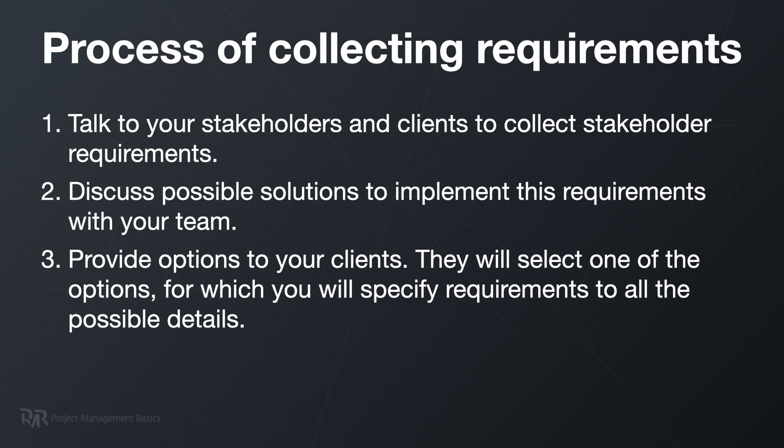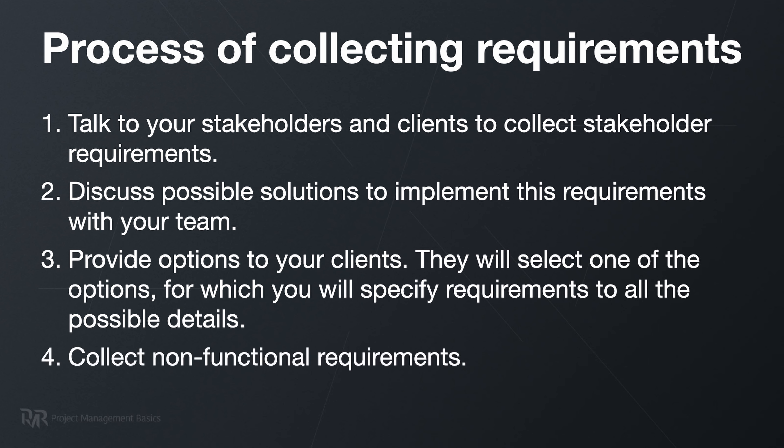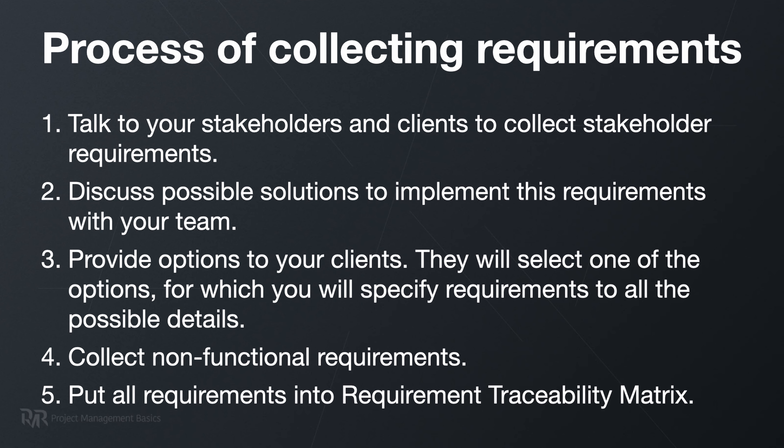You may have one or several solutions, and you provide these options to your client. They select one of the options, and for that option you specify requirements to all possible details. Then you collect non-functional requirements and maybe specify some capabilities or performance metrics that your product or service should comply with.